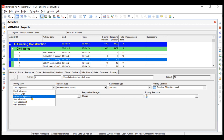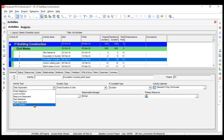Next is level of effort. Level-of-effort activities may consume some number of days — like one day, 0.5 day, or two days — but they should not be part of the critical path because they are supportive activities, such as customer meetings or project management brainstorming sessions.